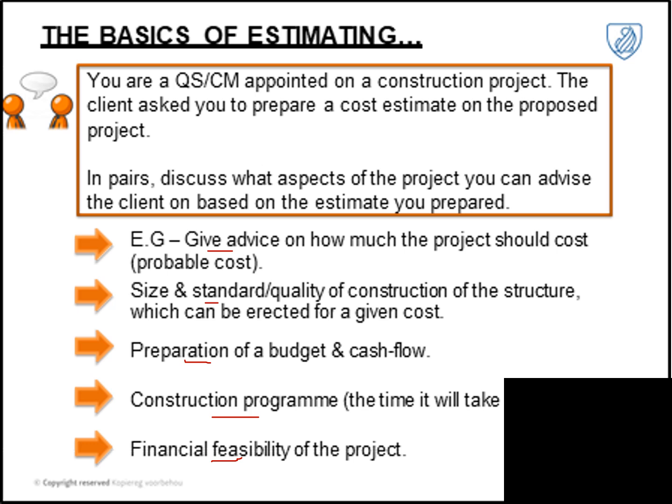And what we discussed is that why we use these different estimation methods is really dependent on the amount of information that we've got available. So you're not going to start preparing a BOQ in stage 1 of your project life cycle, because you don't have the necessary information on the type of finishing, etc., to actually get your descriptions up to a point where you can include it in the BOQ.